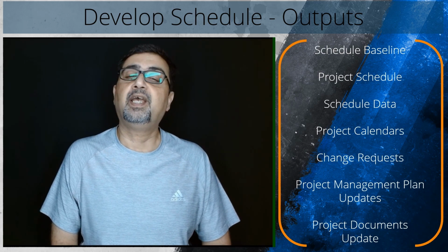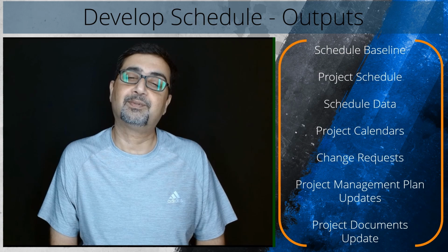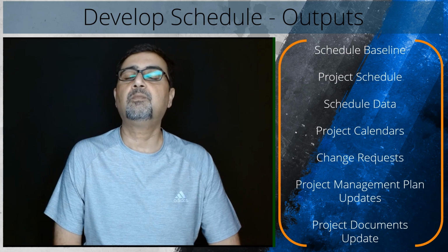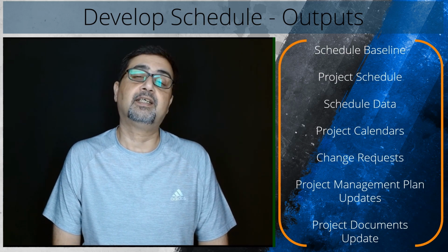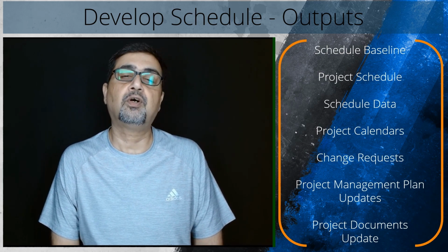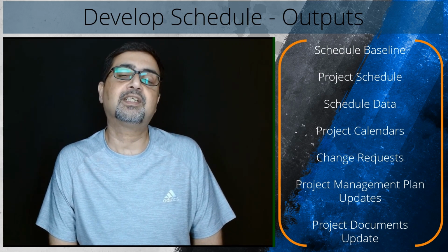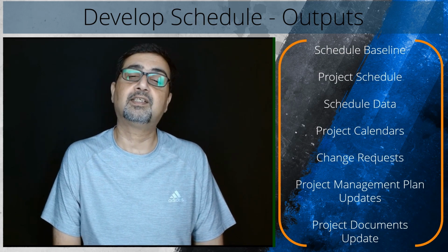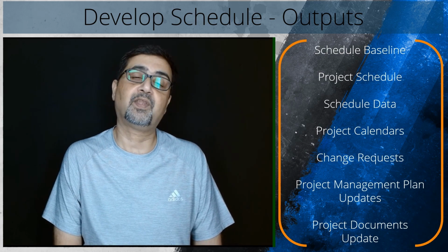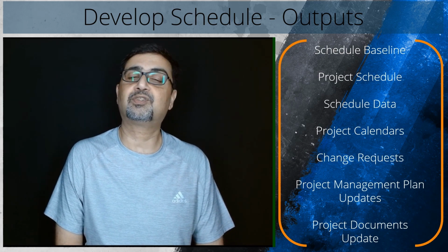The project schedule may be presented in summary form, sometimes referred to as the master schedule or milestone schedule, or presented in detail. Although a project schedule model can be presented in tabular form, it is more often presented graphically, using one or more of the formats like bar charts, also known as Gantt charts. Bar charts represent schedule information where activities are listed on the vertical axis, dates are shown on the horizontal axis, and activity durations are shown as horizontal bars placed according to start and finish dates.